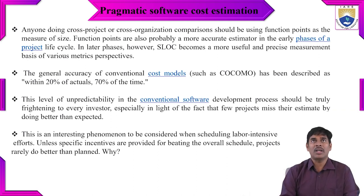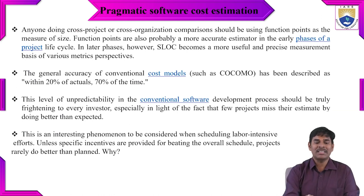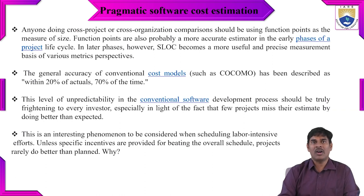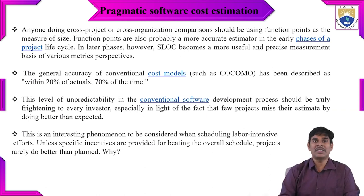Function points are also probably a more accurate estimator in the early phase of a project life cycle, giving more accuracy to estimate the cost of software. Later, SLOC becomes more useful — so initially we consider function points, then in the next stage we consider source lines of code for a precise measurement basis.